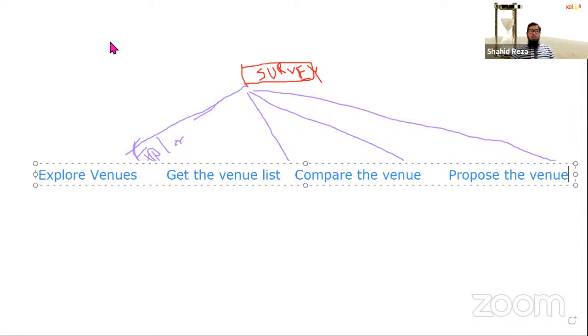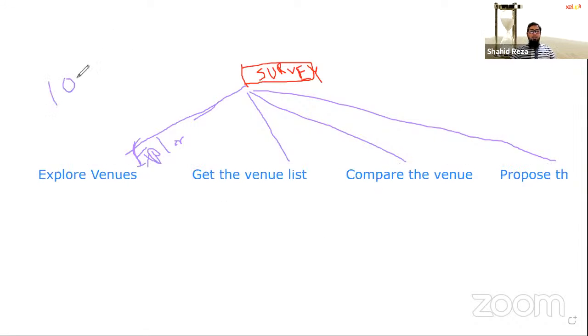All right. So here also, can you remember the 100% rule? When you are breaking a work package into tasks, you also have to focus on the 100% rule. If any task is missing, if you missed any activity, then this work package will not be successful. So here also you need to apply the 100% rule. Now see why WBS is so important, because from WBS we are getting the tasks or activities of the project.